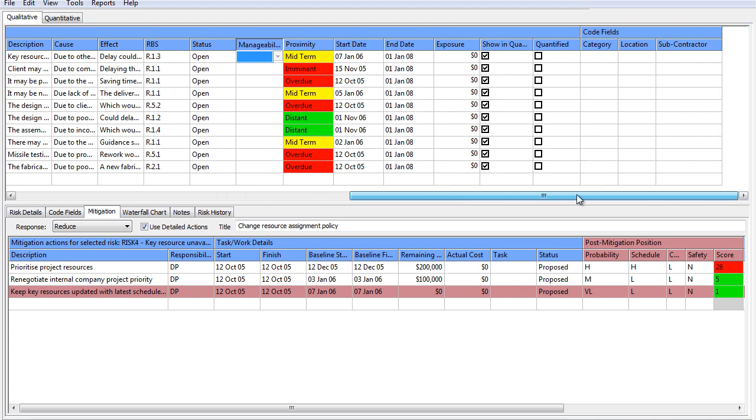You do have a start and finish date for a risk. That one is fairly critical, or is pretty important. Because something like a freezing risk, you'd want to quantify when that season is and what have you, because those risks in a schedule risk analysis, you shouldn't be able to have those fire in the summer, for example. So putting a start and end date, it's also going to help you see when your cost exposure is or what have you.